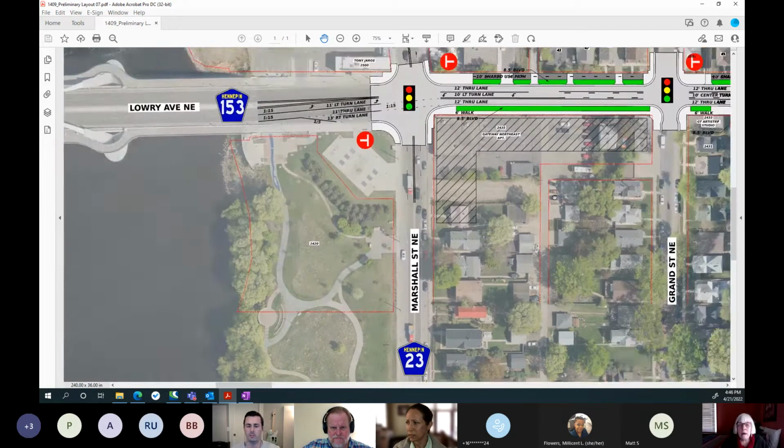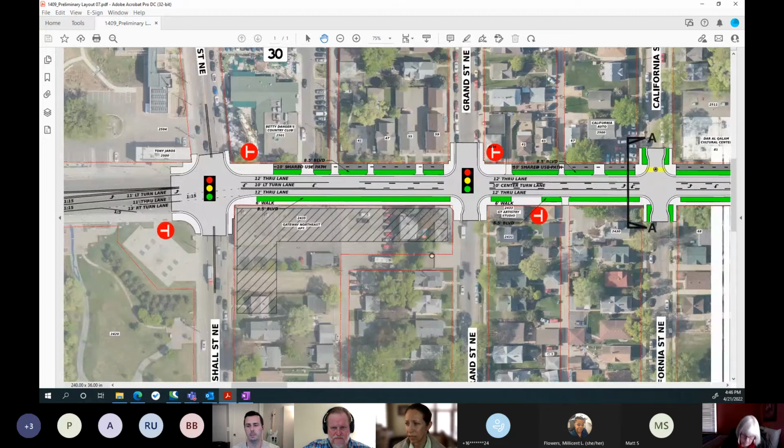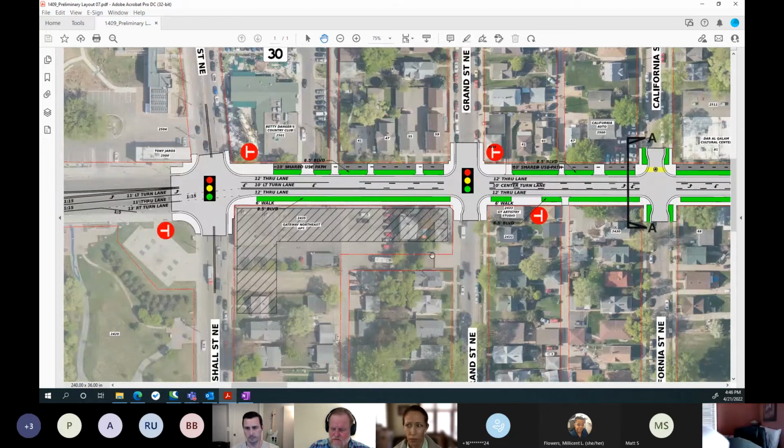So I hit on the construction schedule a bit and how we're looking at shifting that. I'm working with Chris to plan out another round of public information workshop to talk through these updates in more detail. We currently have plans for that to be May 11th. And then we were looking at the timing of seeking municipal approval either later in May or early June of this year, so that we can start to get into the details of the designs more and get input on things like intersection details and just more of the details than what this level layout gets into.